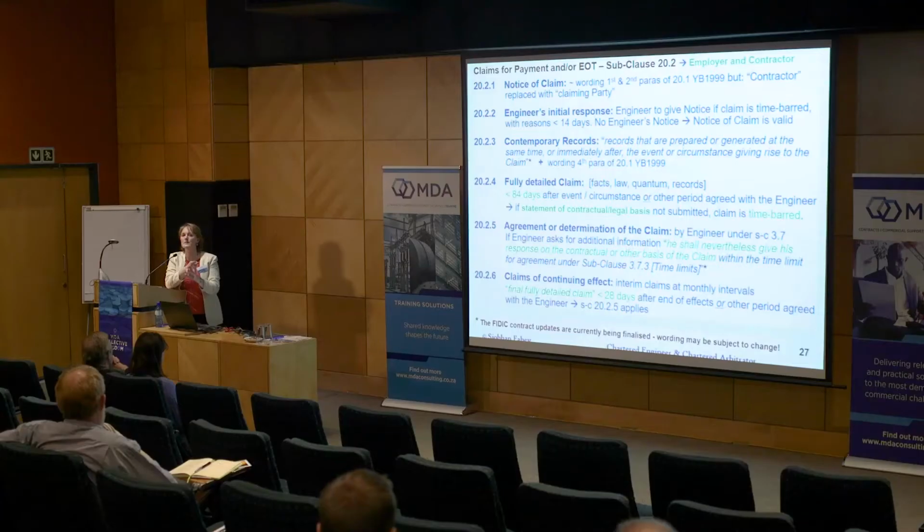And there's a very good reason for that, because if the contractor doesn't take the time or the energy to actually tell the engineer on what contractual basis he's made his claim, then essentially the engineer can't do anything with it. Yeah?